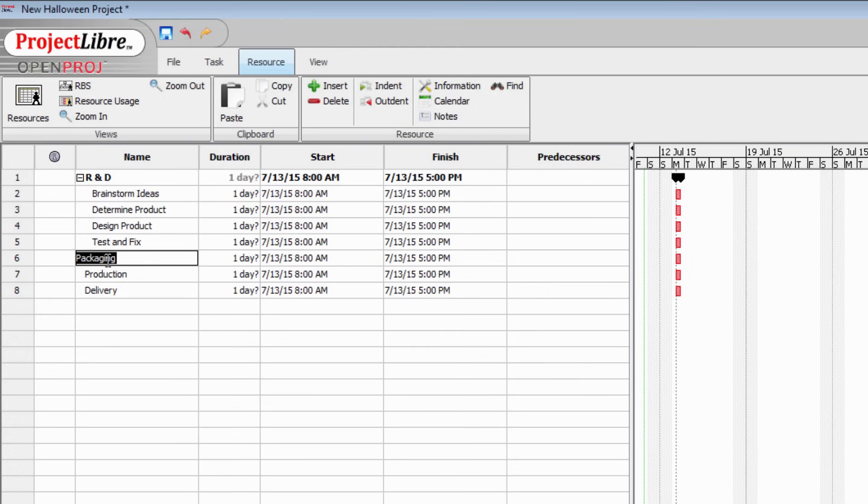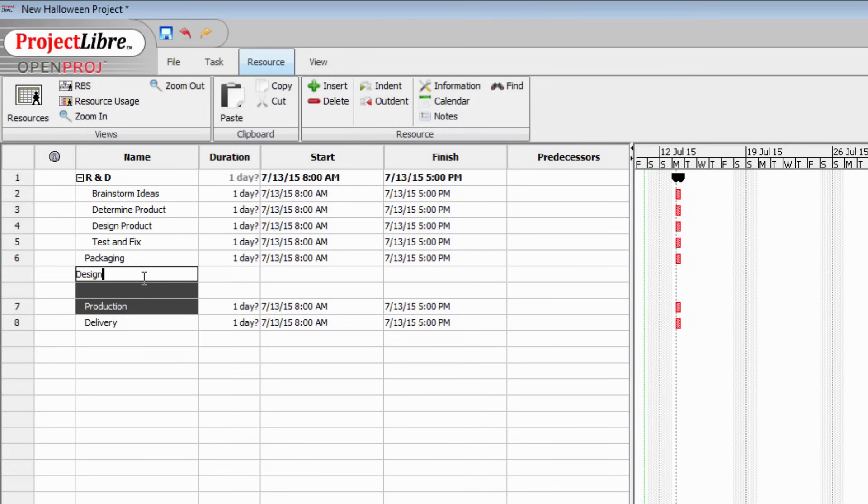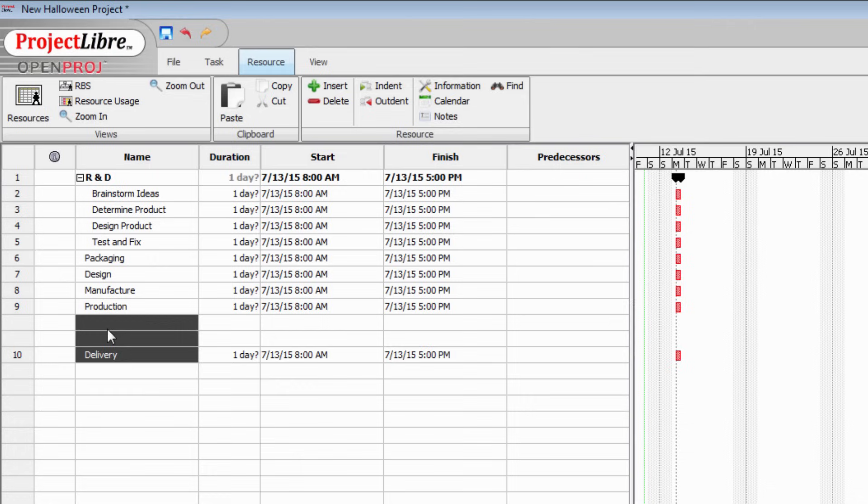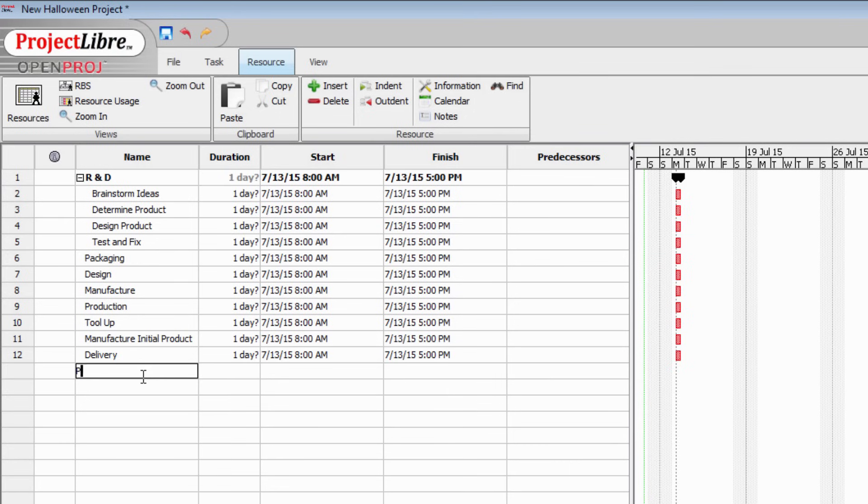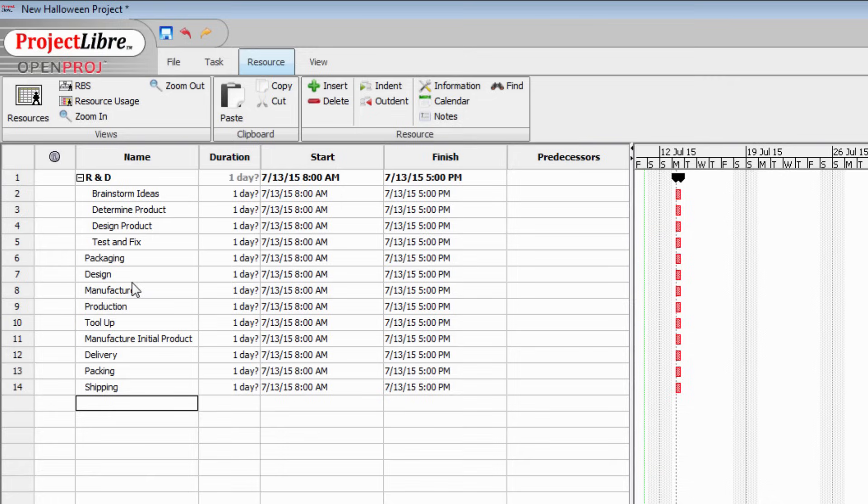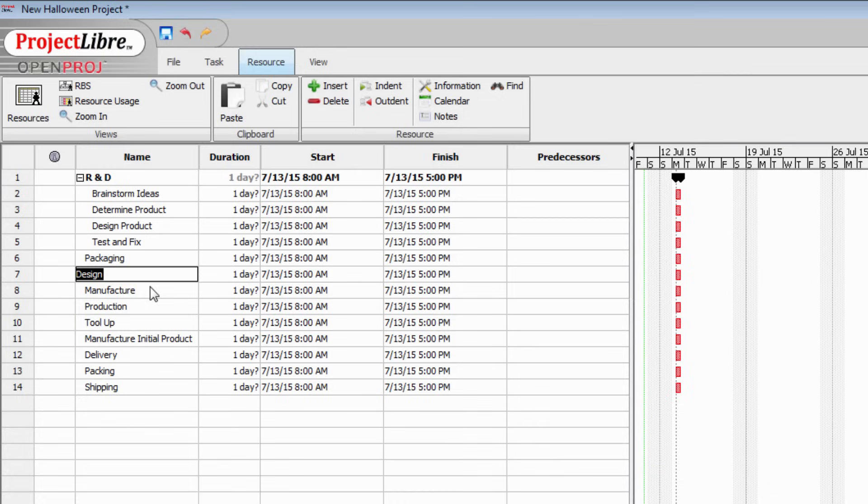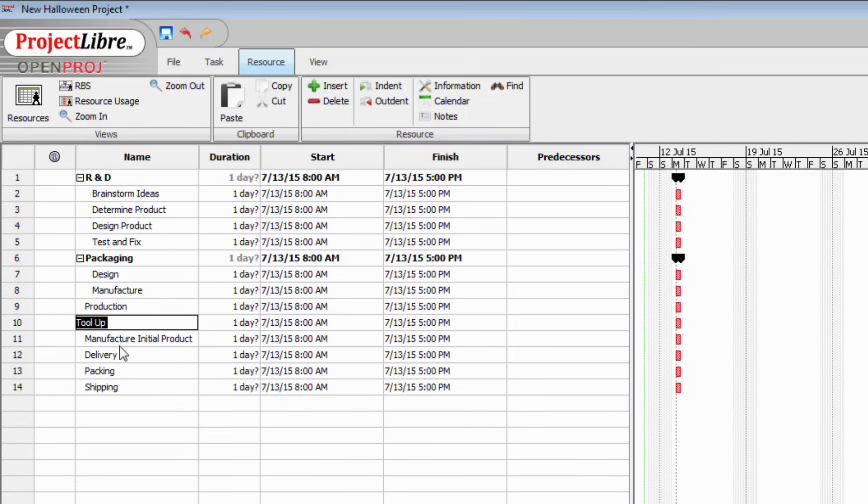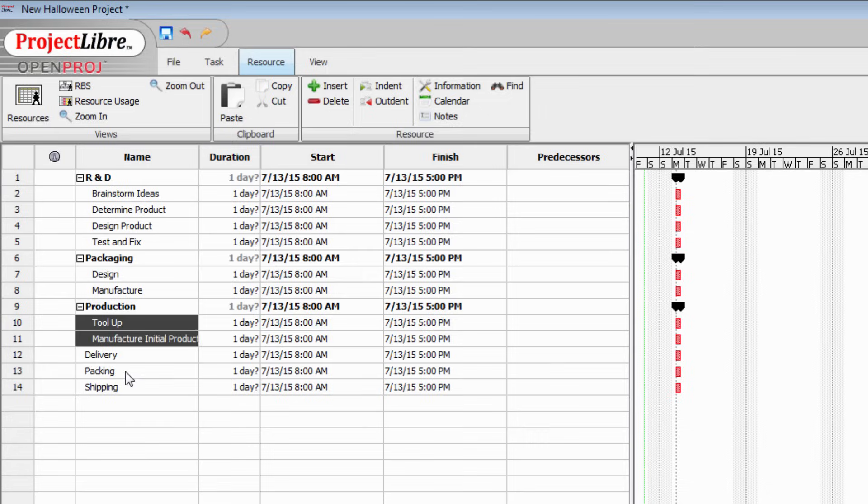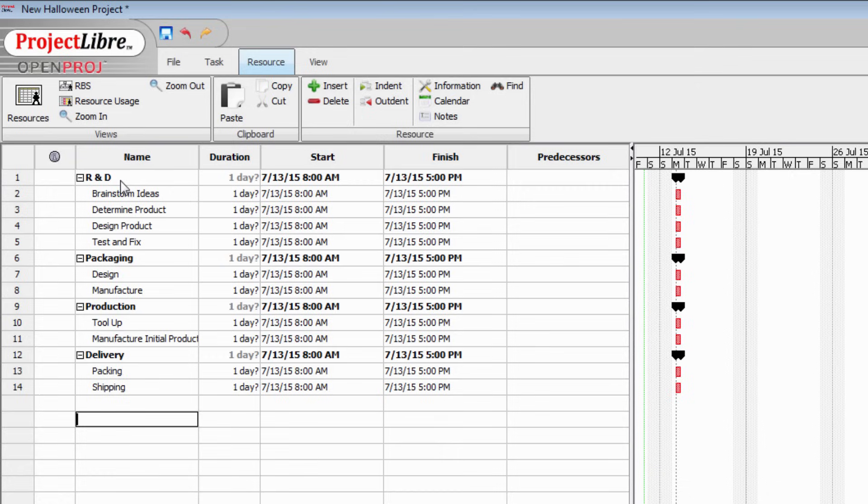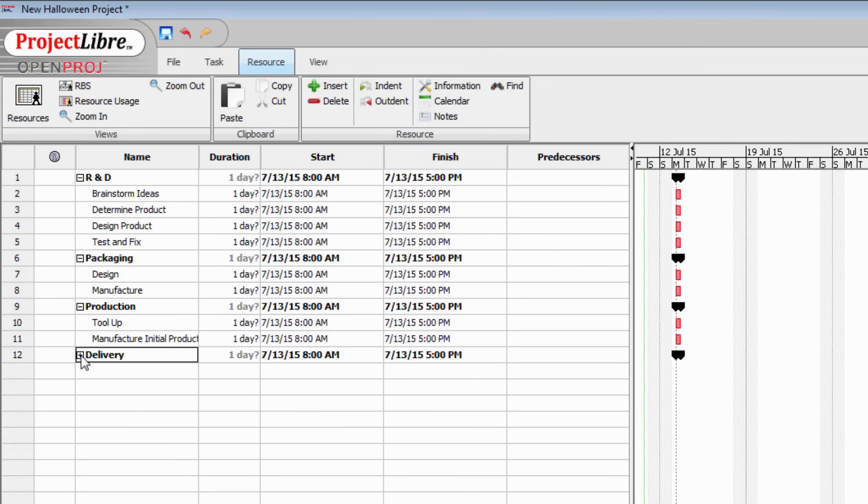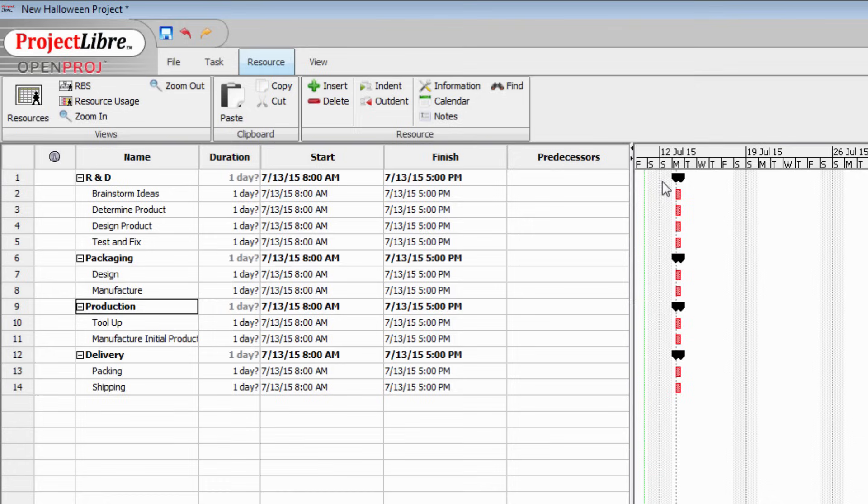Now similarly for packaging, production and delivery there are some subtasks that we need to do. I'm going to go ahead and enter those now. Having entered these, I'm going to select the items that fall underneath each of these topics. Click on one cell, shift click on the next and indent them. Now I'm back to my four main tasks with each of them having a number of subtasks underneath them and each of these can be collapsed and expanded using these little icons here and each of them has a black bar.